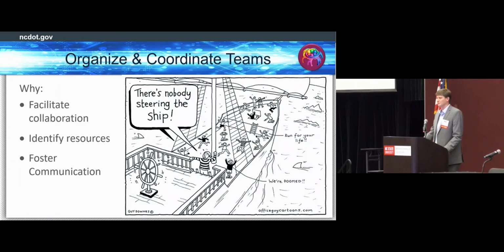And if I have a soapbox, this is one for me. One that's keenly important to me is that the project manager must stay engaged during the right-of-way acquisition and utility relocation timeframe. It is not enough to issue final right-of-way plans and think that you can take a break for a couple of years until we approach turn-in for plans. The project manager must stay engaged with right-of-way agents, ensuring that we're focusing on priority parcels and making those parcels available so that utility relocations can begin at the appropriate time. Project managers, you are responsible for delivering the project on schedule, and your engagement during this phase is paramount.